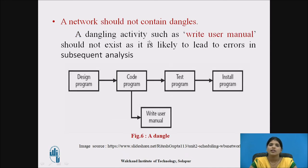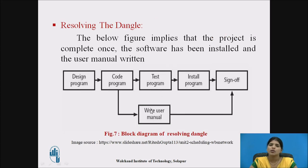The next rule is that a network should not contain a dangle. Here, 'write user manual' should not exist as a hanging activity, as it is likely to lead to errors in subsequent analysis. The write user manual activity is a dangle — a hanging activity — and it is not allowed in the network. To resolve the dangle, after installation of programming and writing the user manual, we must end with a finish node.